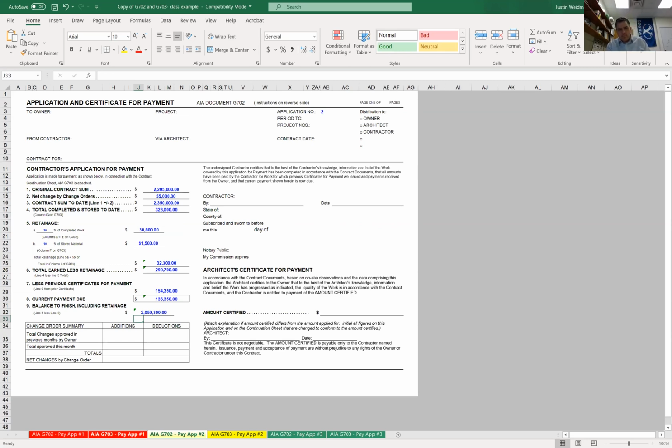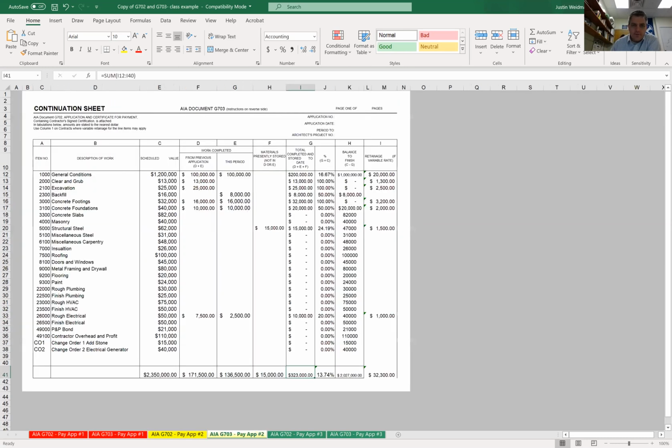So once you've submitted your pay application, you'll go through this every month. Again, you'll make sure that the contractor approves it. And any time I bill for a change order, I would just add that money onto the work that I've gotten done. So if I was going to charge 20 or 50% for the generator, and I'm going to hold it in my shop, then I'm going to put $20,000 on there, and then that's going to change my numbers if I put in those formulas correctly. So you just bill for a change order same as you would for other items that are on there.